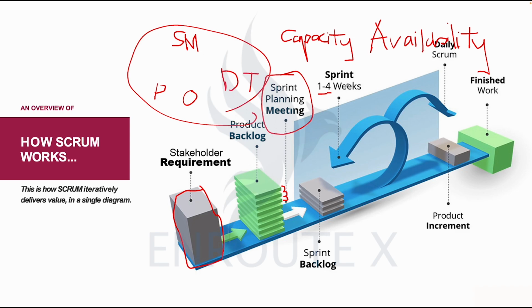What that means is that if an organization goes with 2-week sprints, they stick to 2-week sprints all through to the end. Not in this sprint they run 2 weeks, and in another sprint they run 1 week. And what I mean by sprint is a period of work. That's what sprint means.